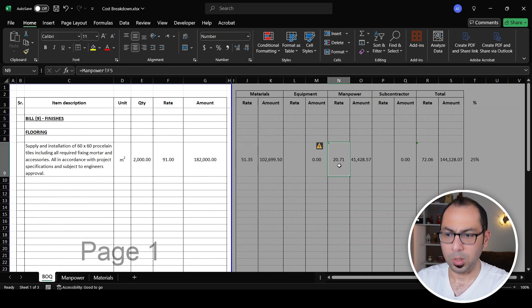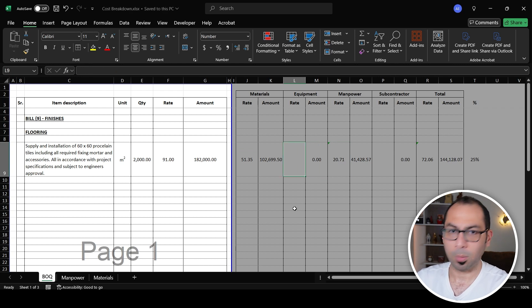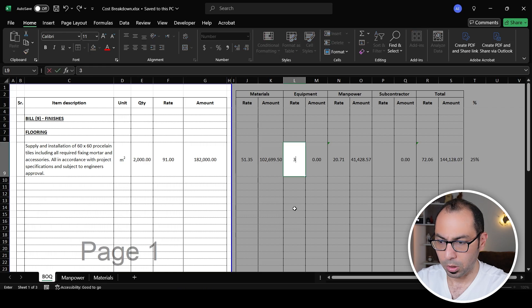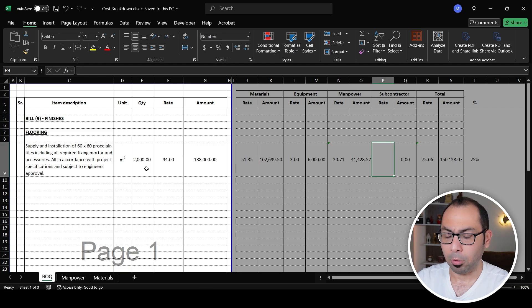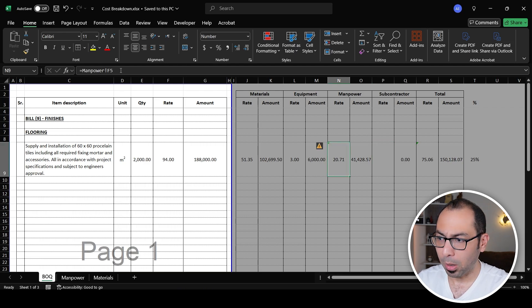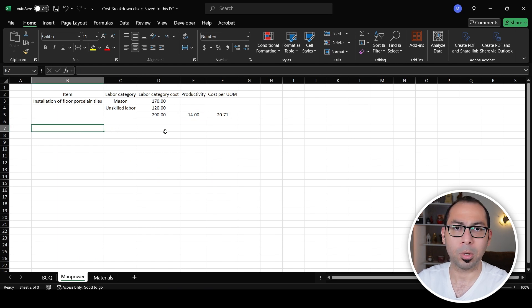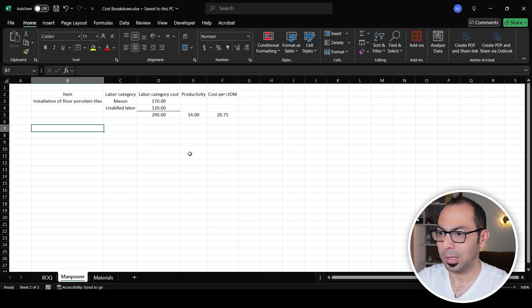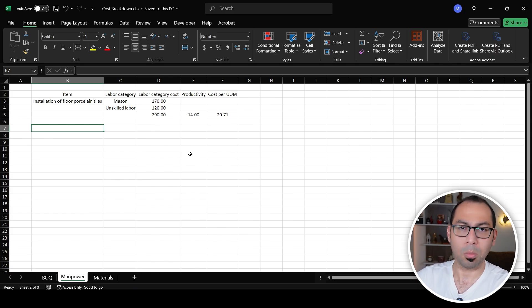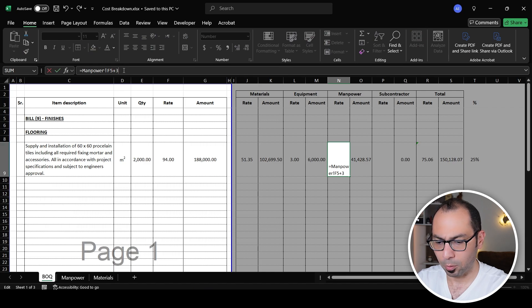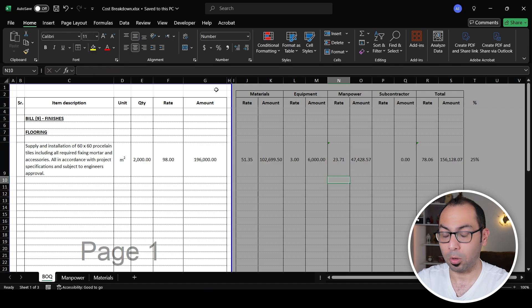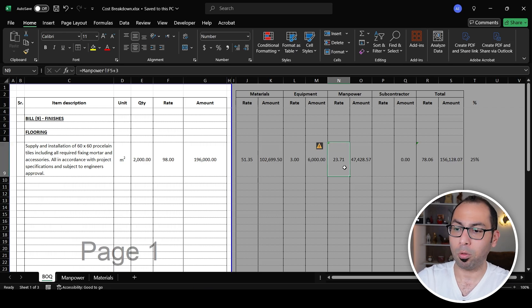For plant and hand tools I'll allow 2–3 per square meter. For subcontractors, in this case I don't need any. Regarding shifting of porcelain tiles to the installation area — you can add a separate manpower line for that, estimating how many unskilled laborers and how many square meters they can shift per day to get a cost per square meter. I'll allow 3–4 for shifting.